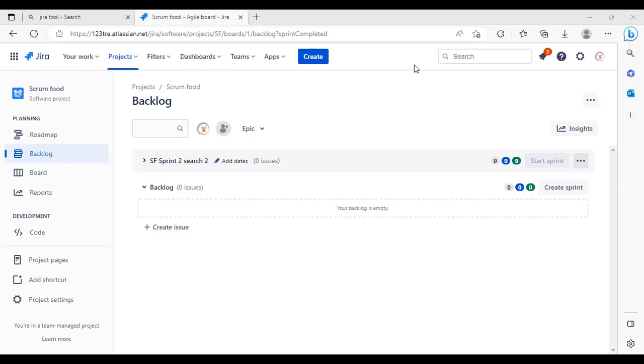So we will add that change request to the product backlog, where everybody has their own access. You don't add any change request in the sprint; you add it in the product backlog only.